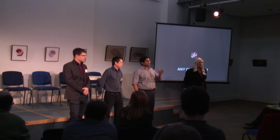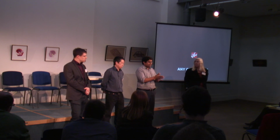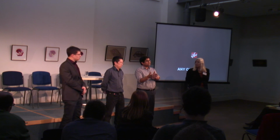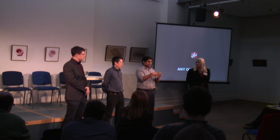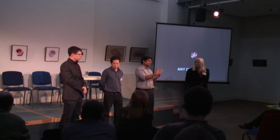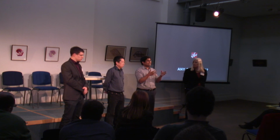Yeah, definitely. If you're virtually building something, just from a pure materials point of view, you can have, for example, off-site construction, and because everything is coordinated, you can be much more certain of it. You can bring in kit made in a factory, speeding up the process, which is probably what happened in the Ferrari as well. So it allows you to reduce the wastage on site, because if everyone's on board, they know exactly how much to order. So there's that element of it.